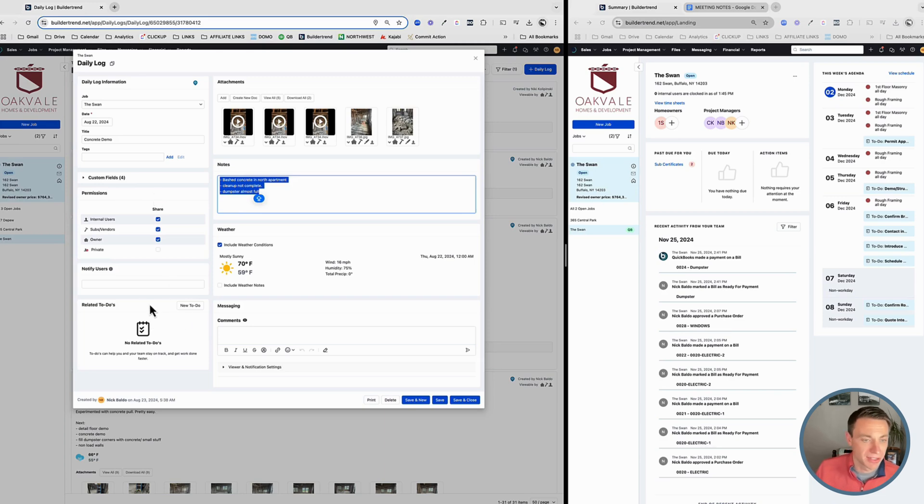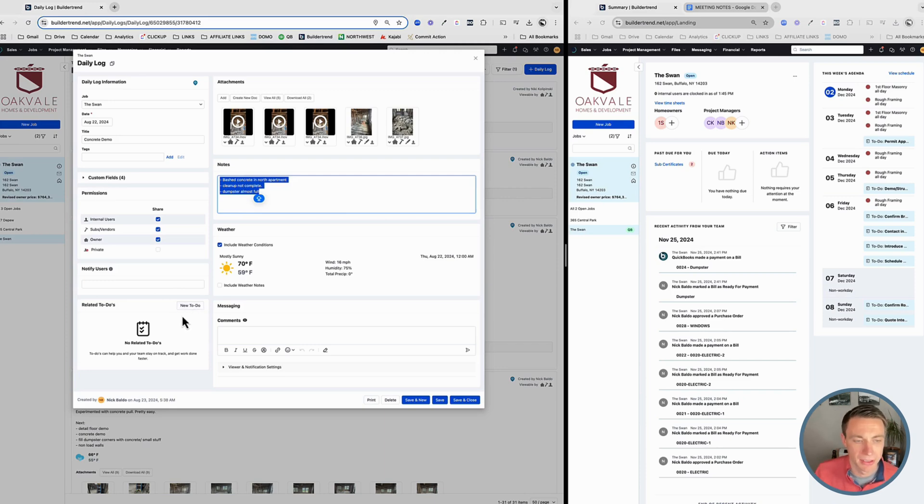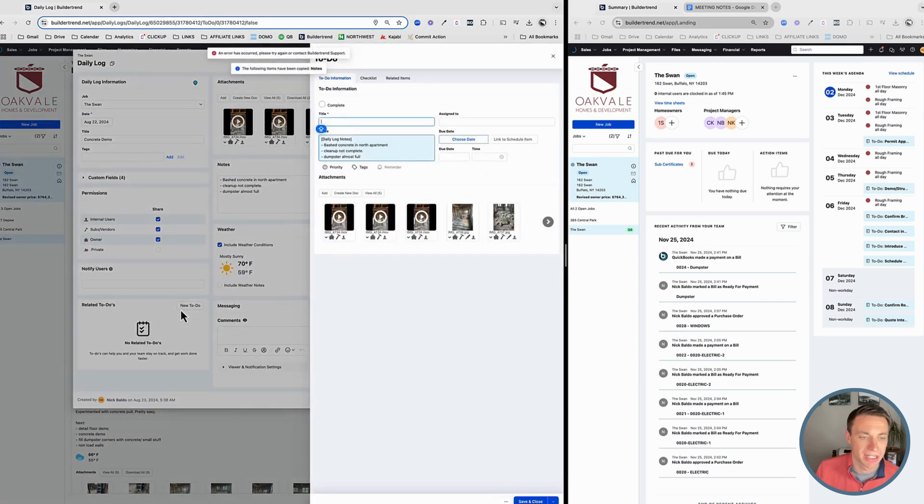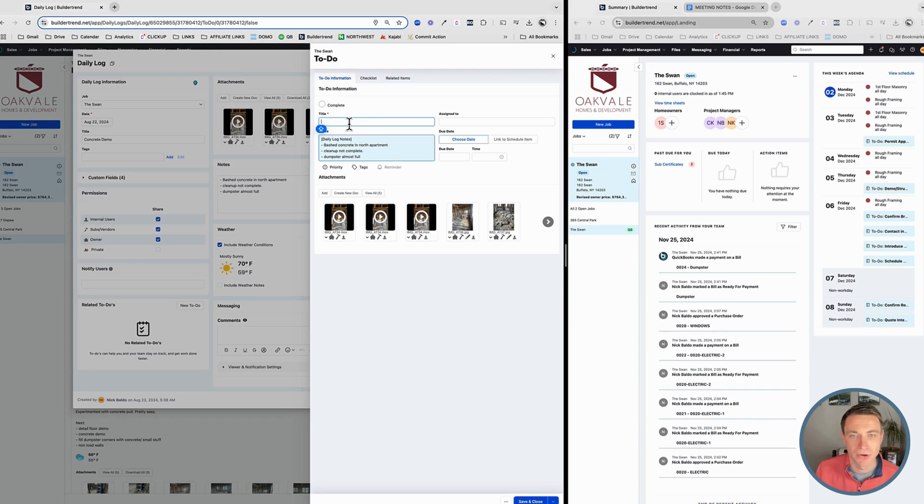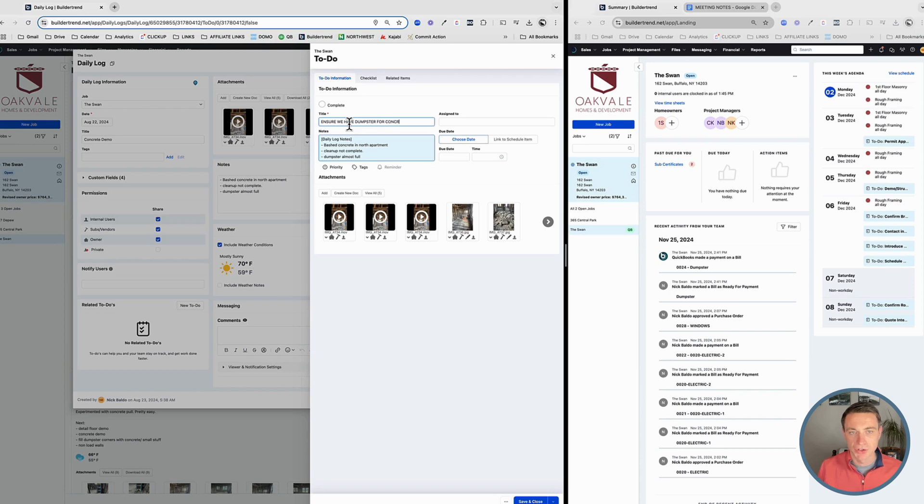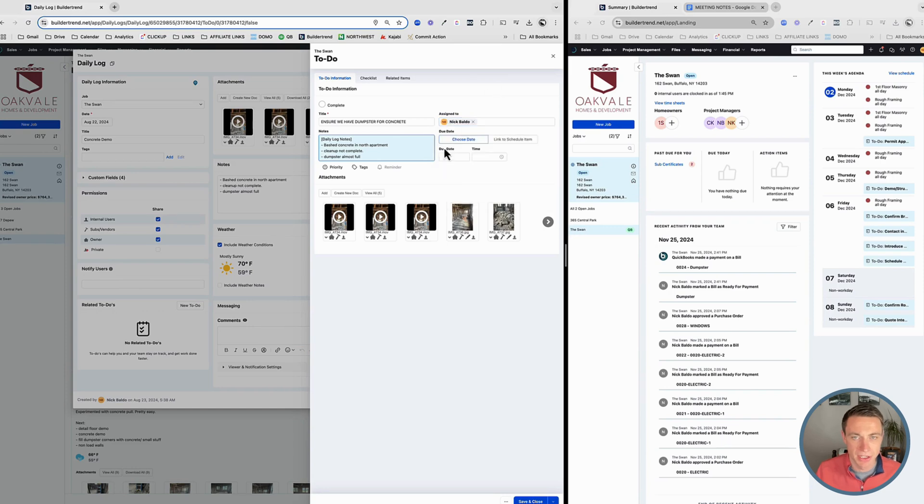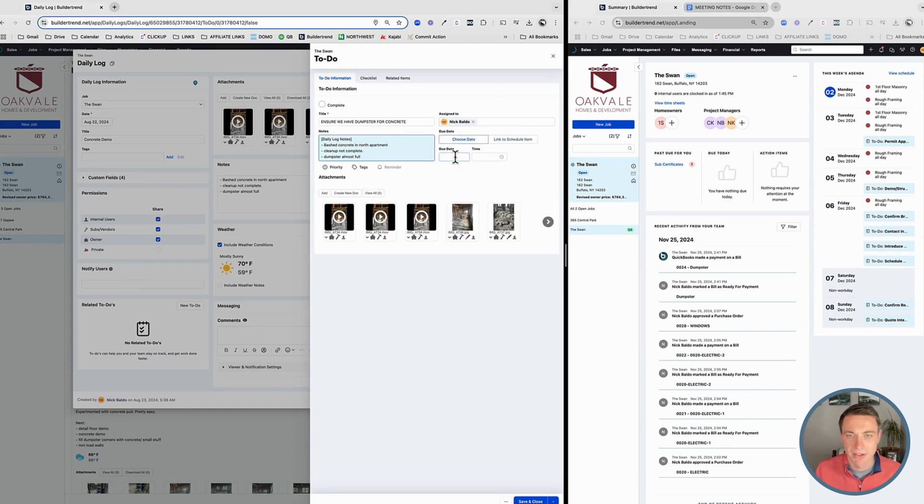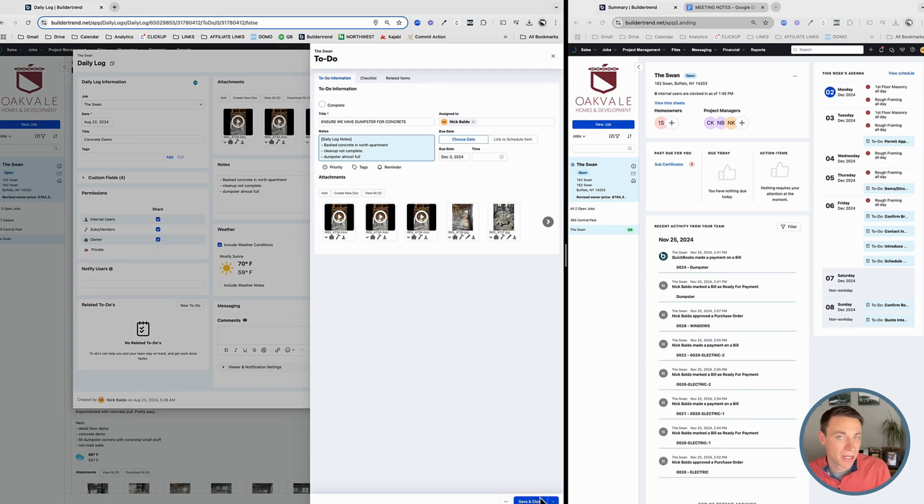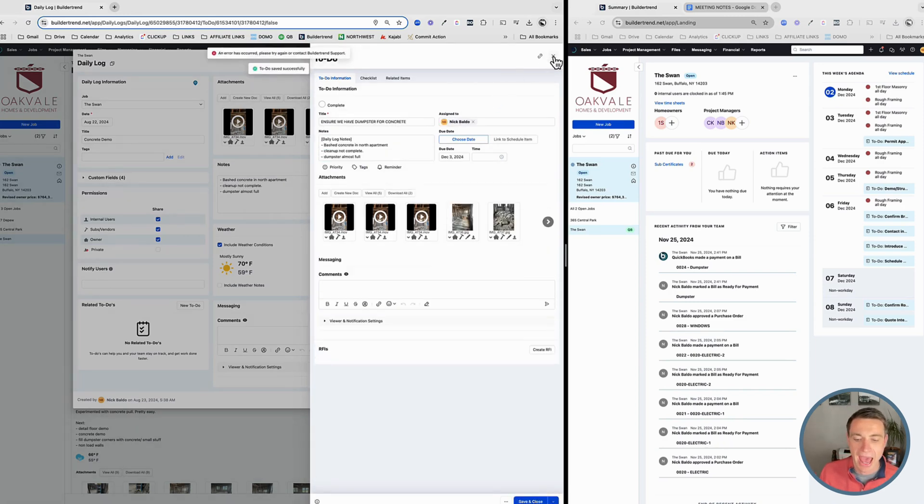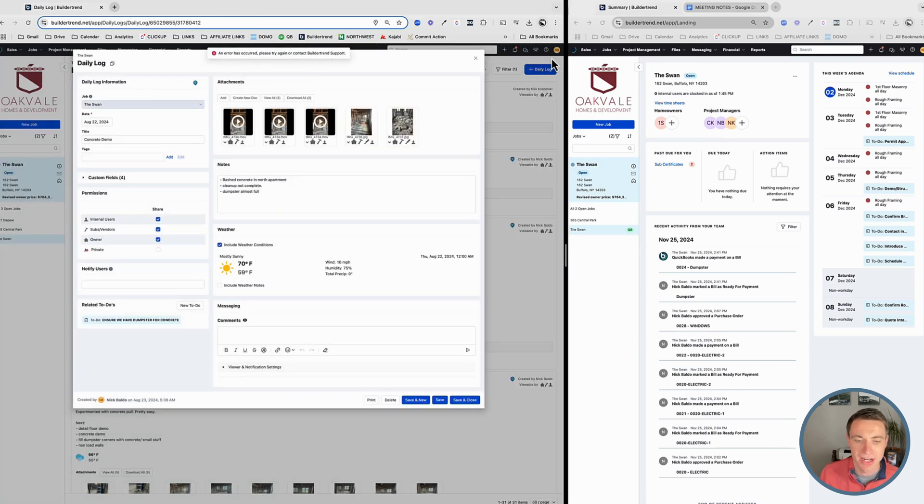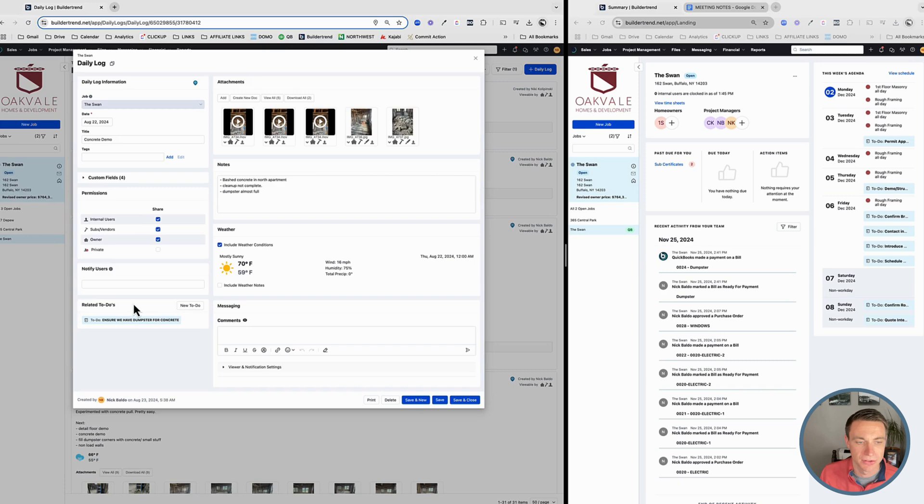Now, one thing that's relatively new to BuilderTrend is all this related stuff. So related to-dos, and this is a really good feature, meaning coming out of a daily log, coming out of a day's work, I can add a to-do that is then related to it and see how I create that to-do and it brings in all that stuff from the daily log automatically. And I can say, ensure we have dumpster for concrete. We just did a bunch of concrete demo. And so let's make sure that we have a dumpster for the concrete and that's going to be due. I can link it to a schedule item or just create a due date. We of course have our checklist and related items here. We have a separate video on to-dos. We won't get into it too much here, but the fact that we can have a to-do that is related to a daily log is really, really useful. So I save that and it shows up right here. That's awesome. Really, really useful.